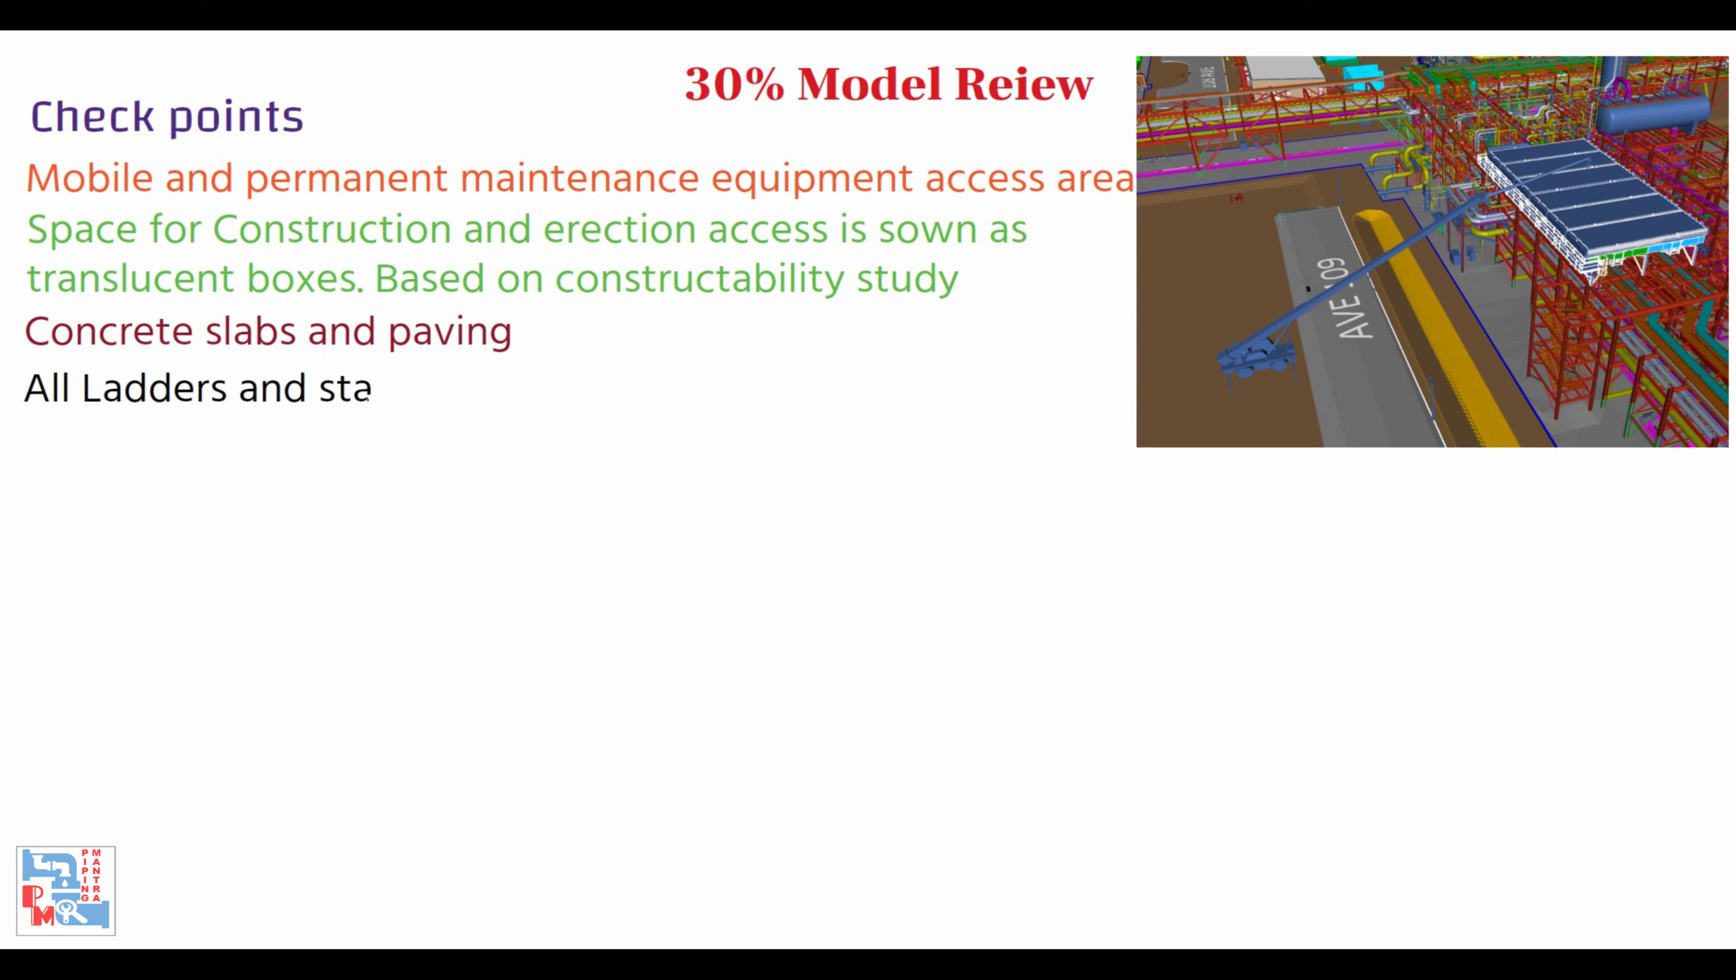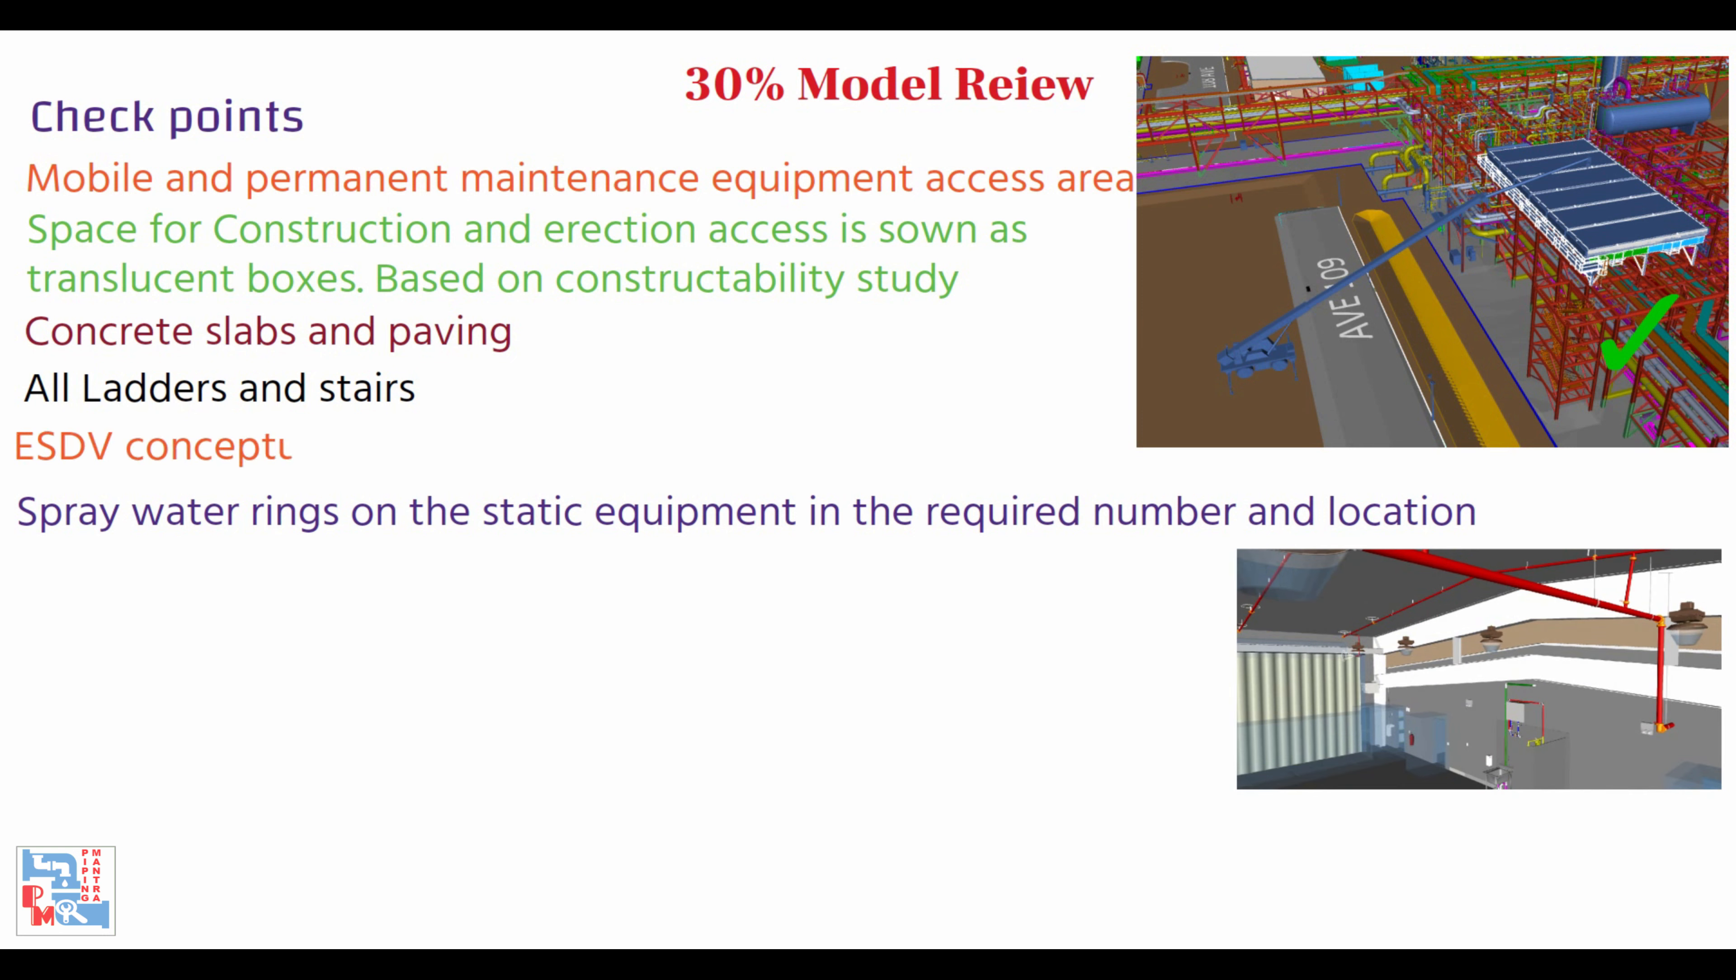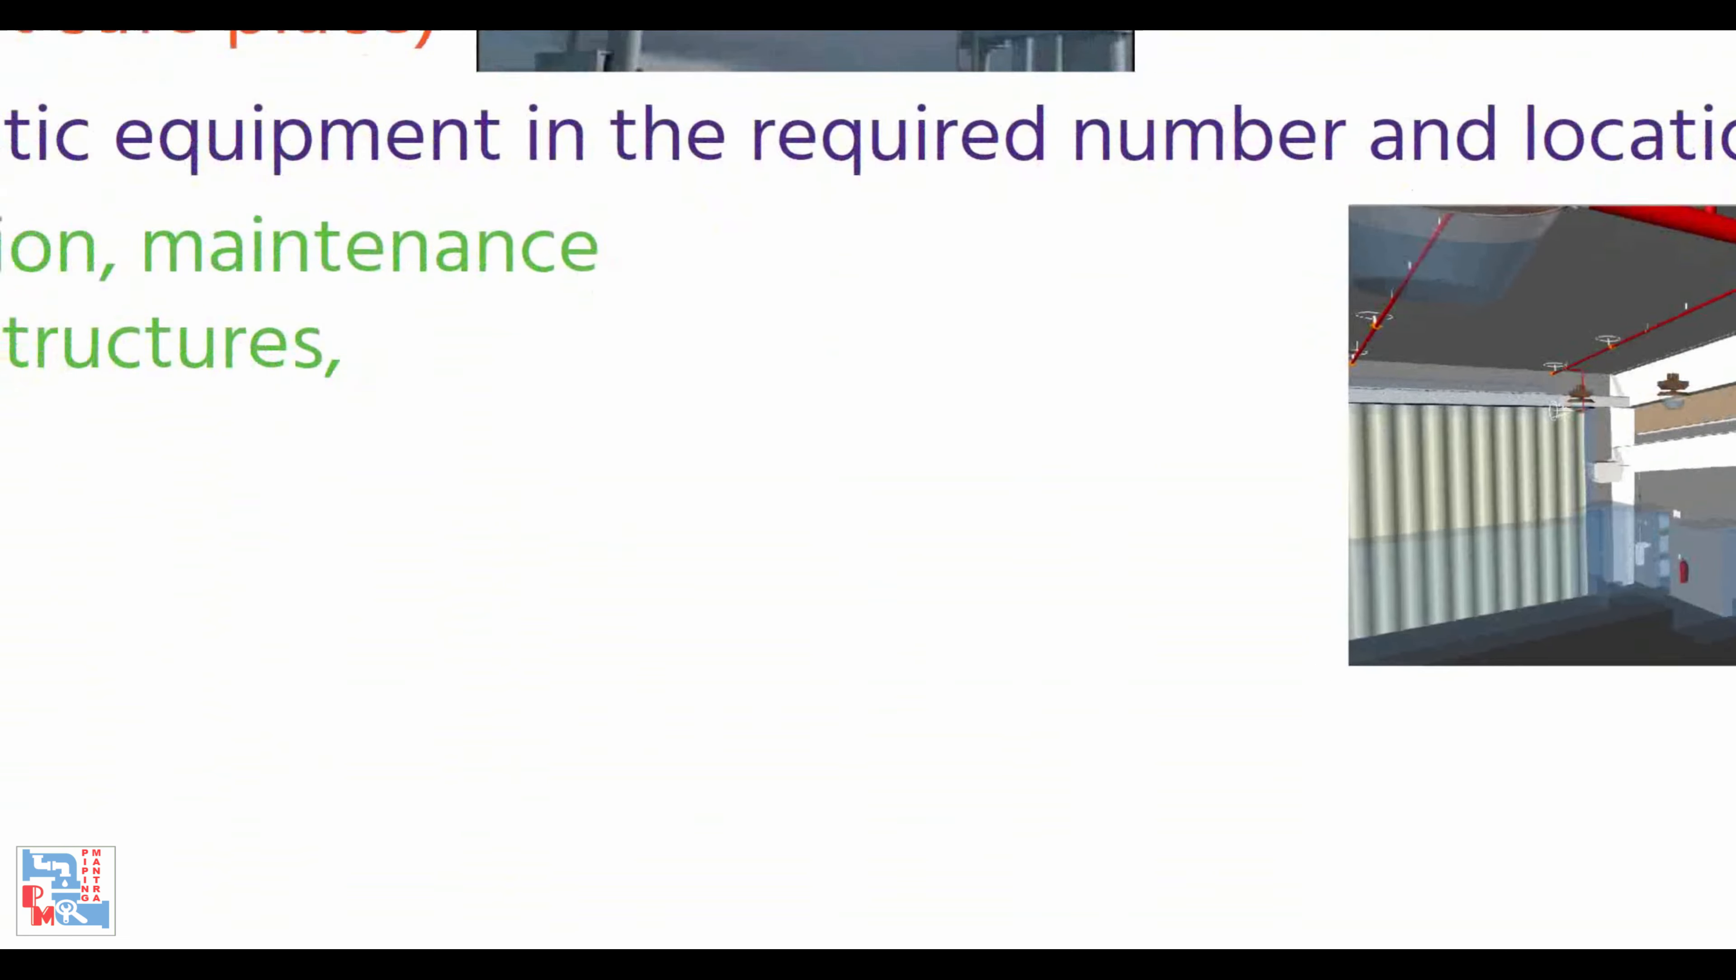All ladders and stairs are modeled and checked. Spray water rings on the static equipment in the required number and location are modeled and checked. ESTV conceptual location at a safe place is modeled and checked. The requirement for operation, maintenance and access to equipment, structures, shelters, and buildings have been checked.